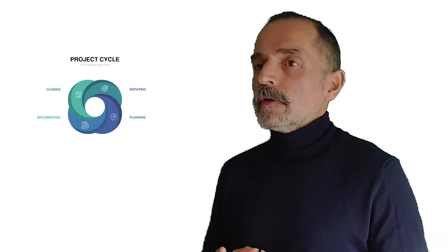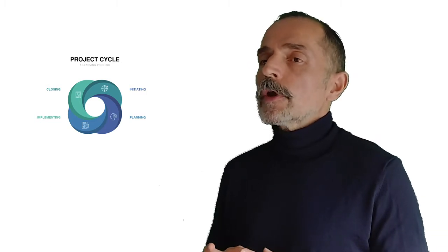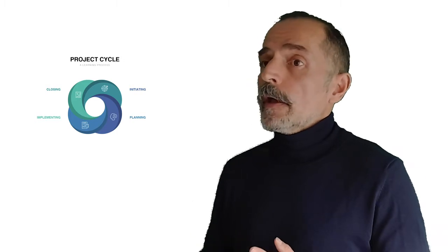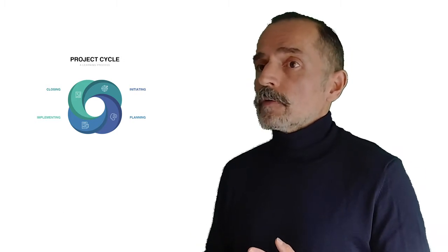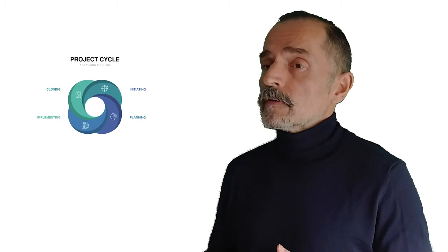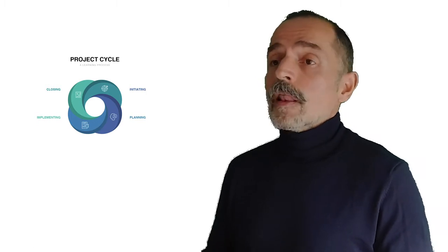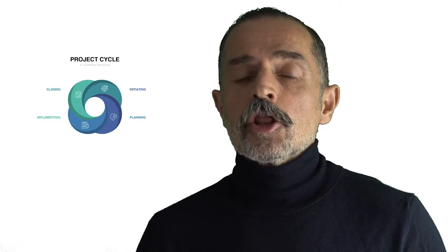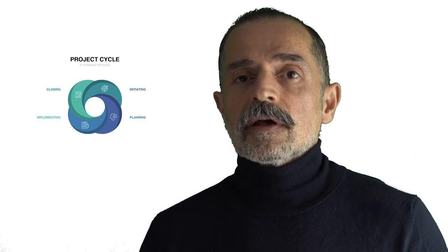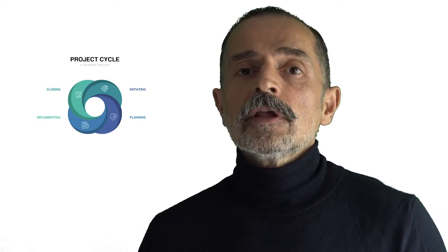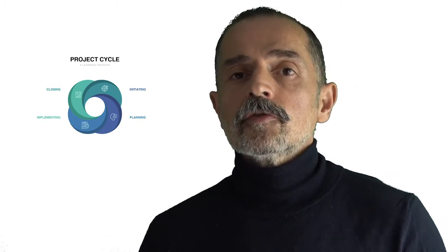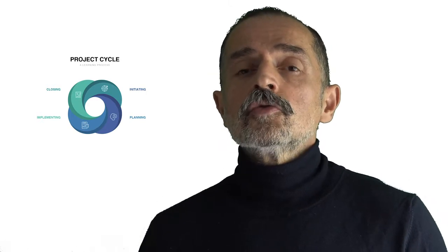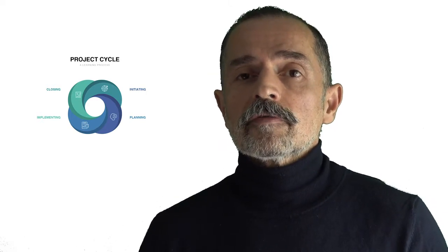During the closing phase, you will focus on securing all the organizational assets that have been produced by your project. Handbooks, teaching materials, communication pieces, reports, laws, everything that has knowledge inside that can eventually be used in the future as best practices or as lessons learned should be protected during the closing phase.